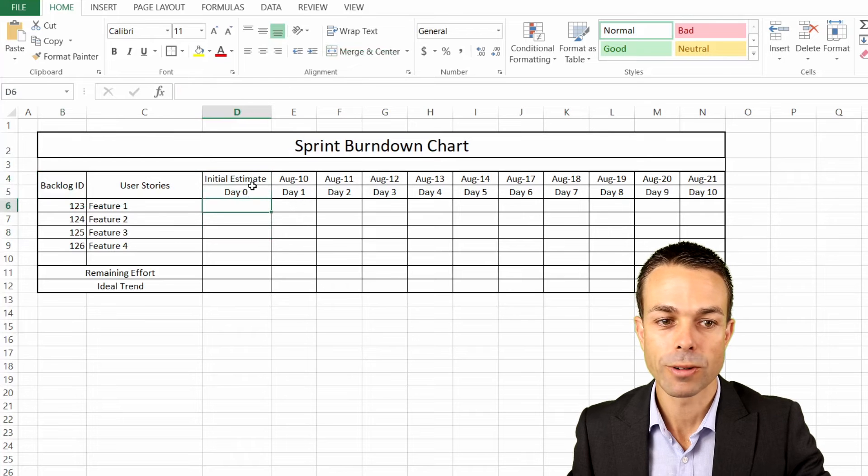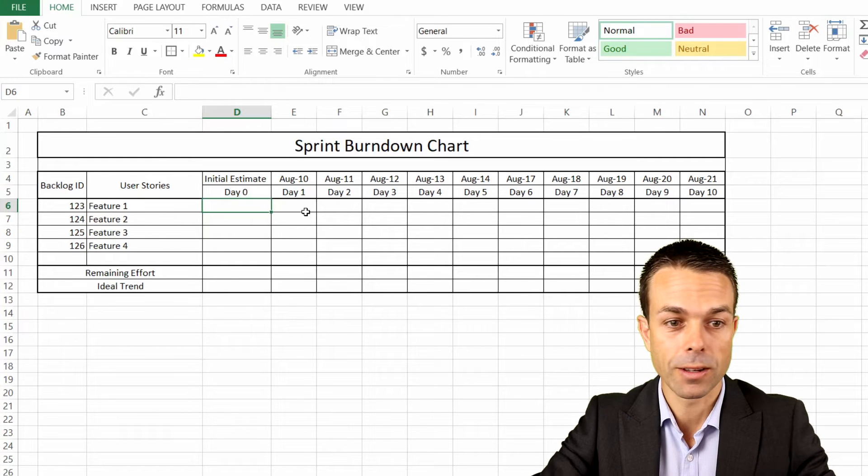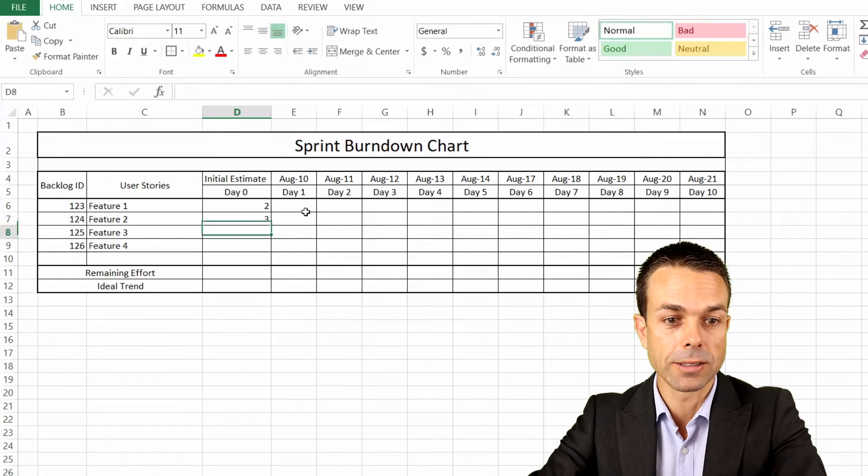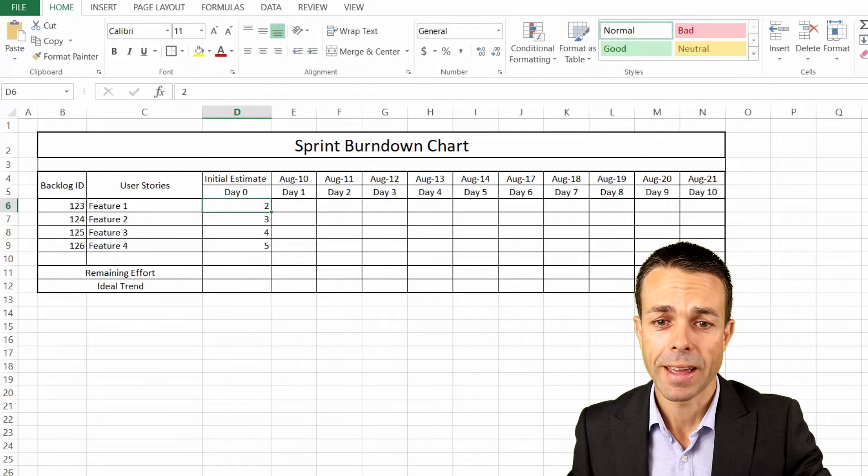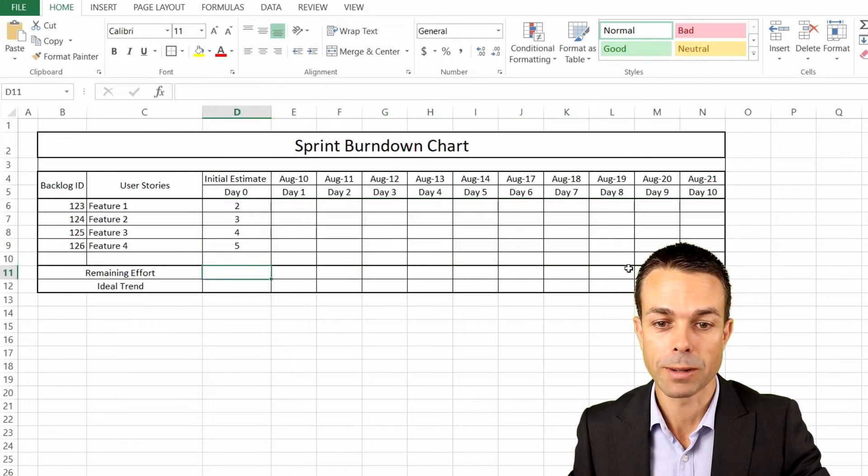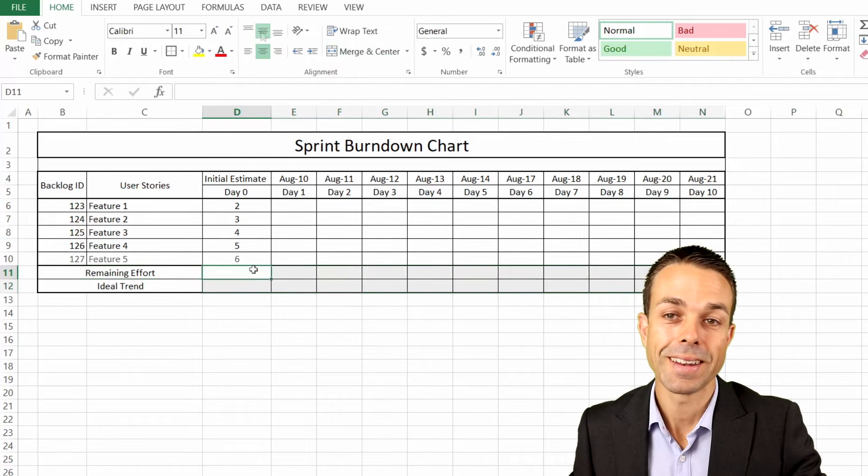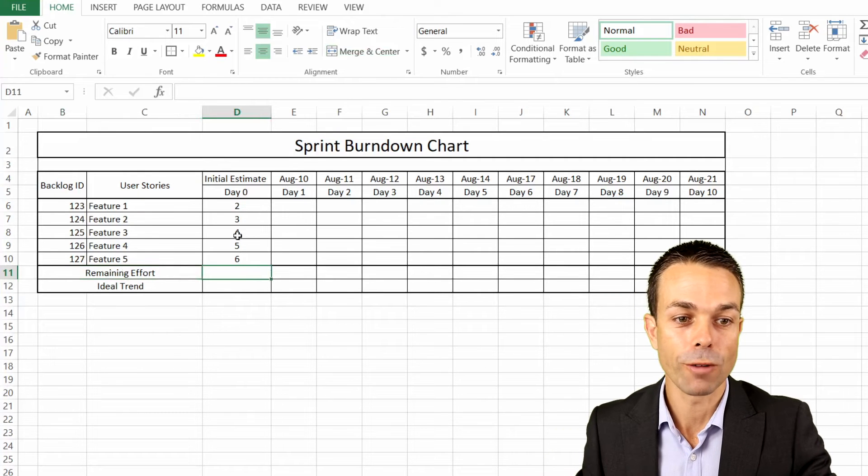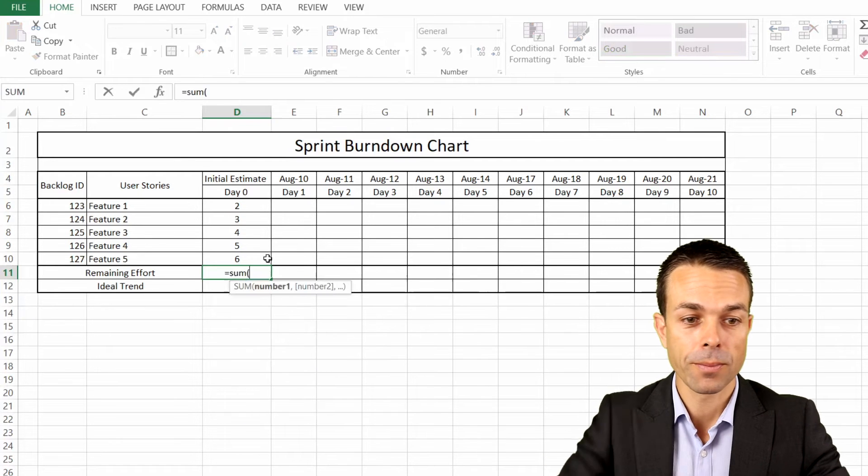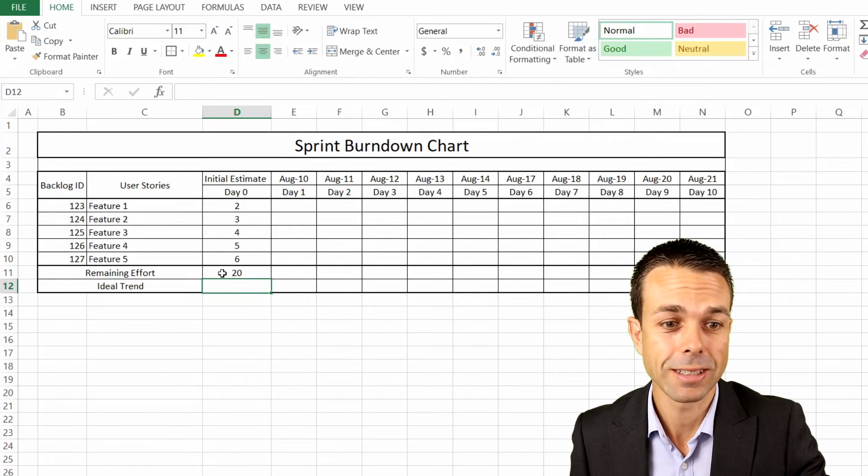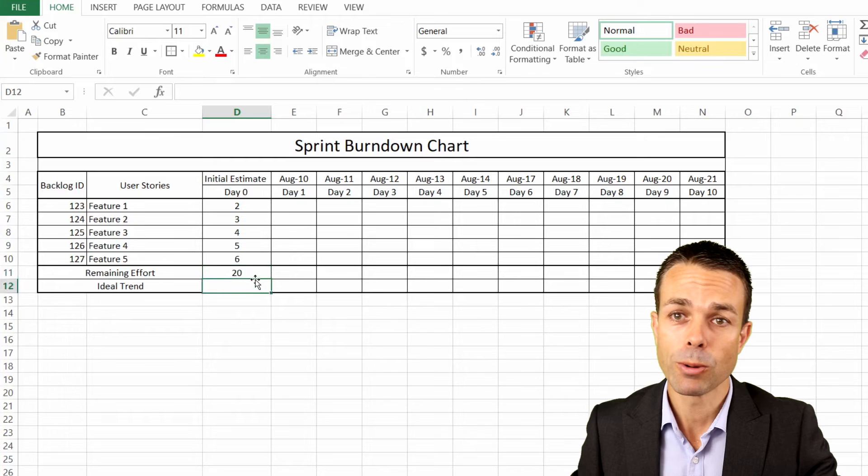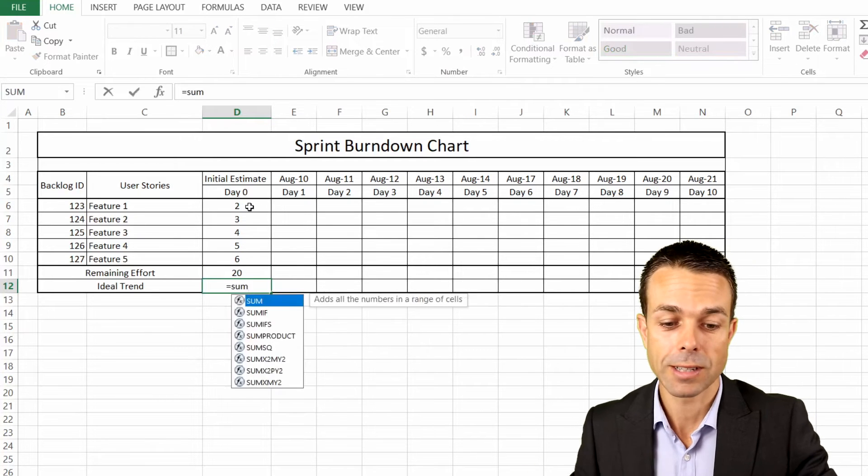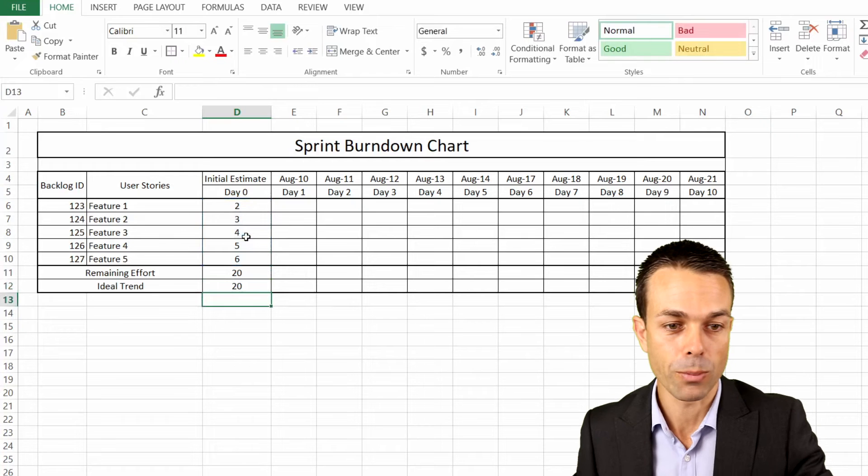For our initial estimate, we give ourselves what do we think this card will take. So will it take two days to complete? Maybe this one will take three days, maybe this one will take four days, maybe this one will take five days. Now we're wanting to give ourselves the remaining effort. We just want to do a total of our initial estimate here. We say equals sum, and we just take all of these boxes and close that off. So we've got approximately 20 days worth of effort. We want the same for our ideal trend.